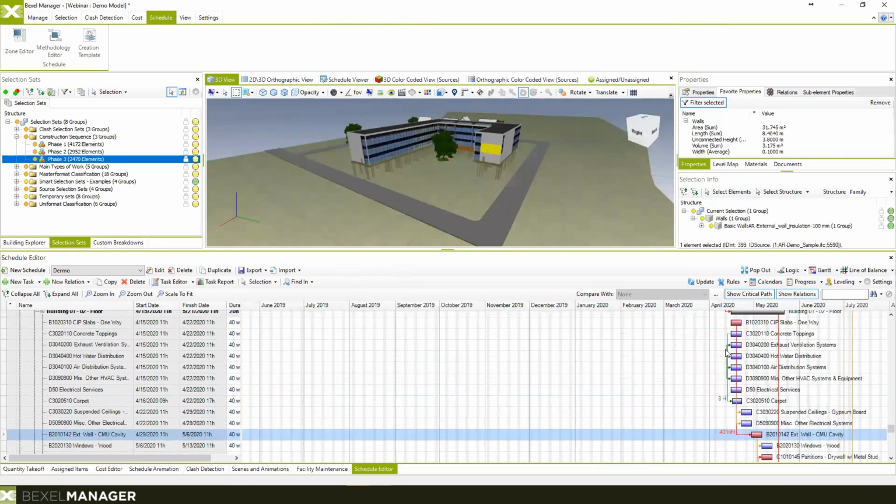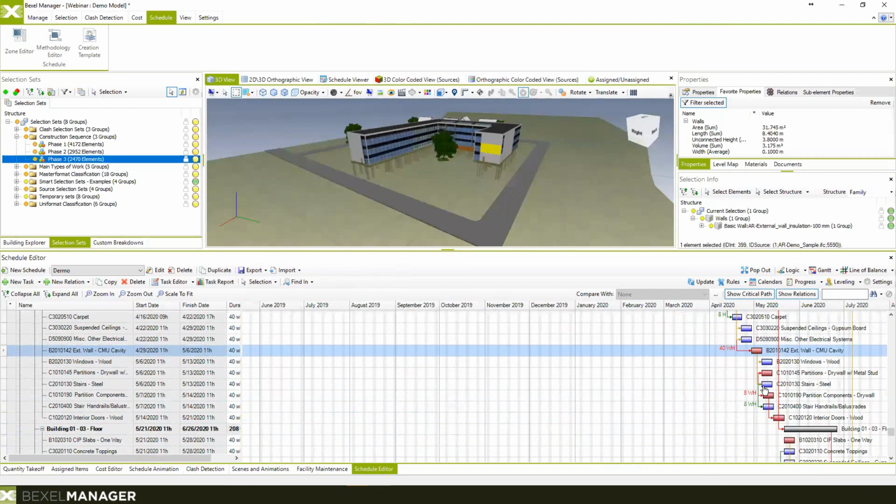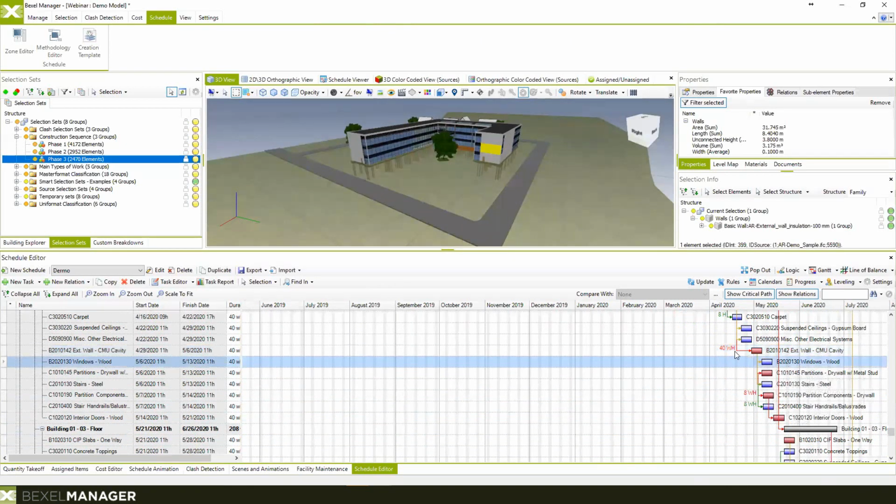So all these activities are automatically generated, and they have some default duration, but the additional feature and the great thing about our software is that you can change the duration of any activity, for each activity, and all these links, or actually relationships with different activities, will be followed when we change it.